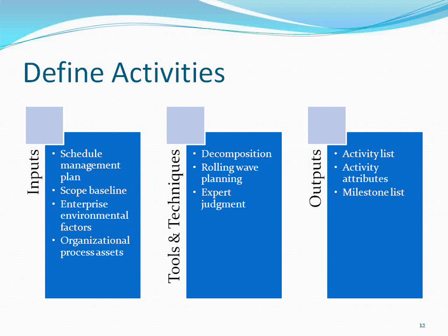Painting is a much later activity which will happen later. It will not happen now. So the nearest thing you will plan in detail, and what you are going to do later in the future, you will put at a very high level. You don't plan in detail. That is called rolling wave planning, and this is also called progressive elaboration.